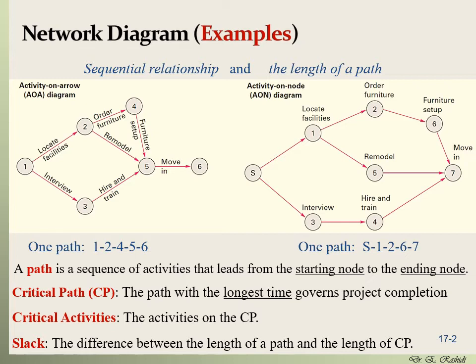So now that we learned about critical paths and critical activities, we can talk about a slack. A slack is the difference between the length of a path and the length of the critical path.